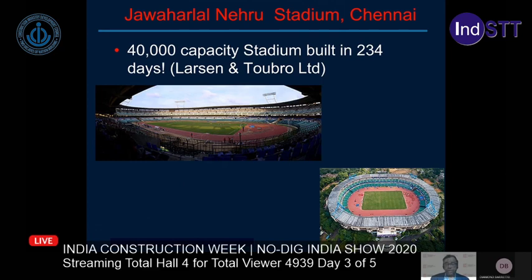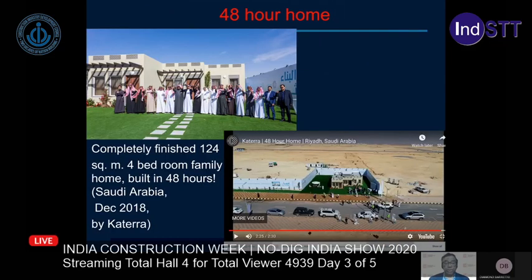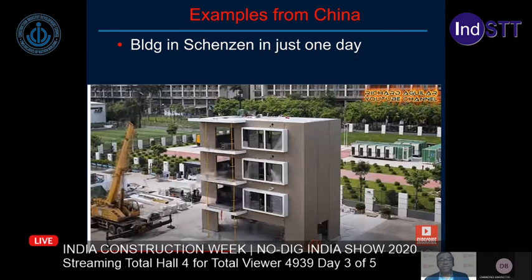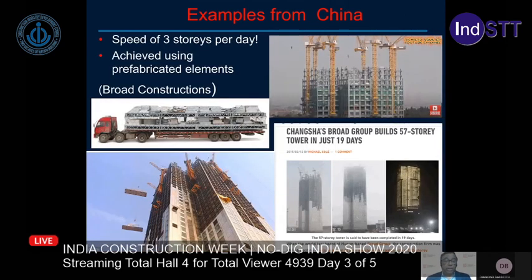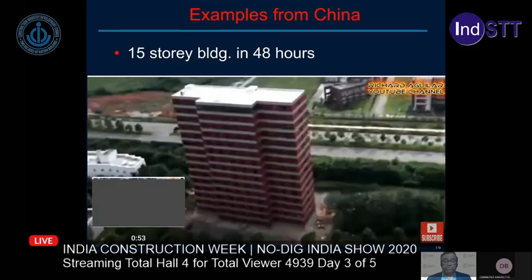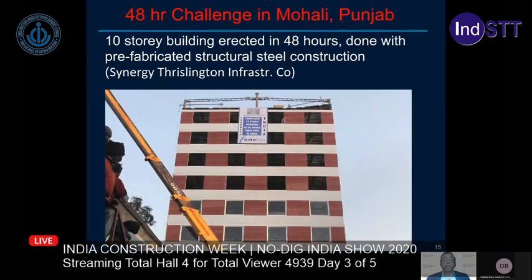Some examples of fast construction: the Jawaharlal Nehru Stadium in Chennai was built in just 234 days using precast concrete. Recently, Katera finished a four-bedroom family house in just two days in Saudi Arabia. There are many examples from China where buildings have been completed at a very fast rate. Even in India, in Mohali, someone built a 10-story building shell in just 48 hours.